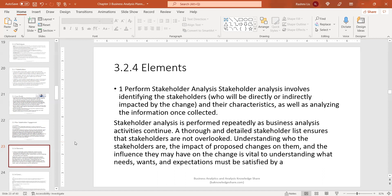Once you collect that information, it's important to sit down and analyze it — for example, does stakeholder A represent a domain SME, does stakeholder B represent the sponsor, could the sponsor and the SME overlap? As you go through this exercise for every project, it becomes easier and you'll see similar traits. Stakeholder analysis is performed repeatedly as business analysis activities continue, ensuring stakeholders are not overlooked.